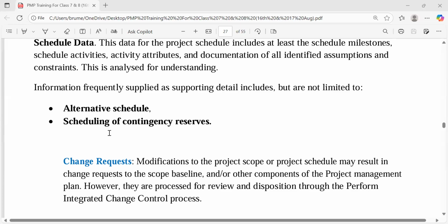We have another one, the management reserve. Management has looked at us and said we have done a good job, but then they look at Nivik and I, they say, oh, we can't trust them. Why not we keep money apart somewhere, hidden somewhere, that they would not know about? This money or this time frame may not be declared, may not be in the schedule. Yes, they have told us 3 months, but let's have an additional 15 days in our minds.